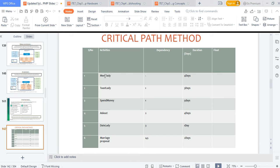Critical path method example using a marriage analogy: activities are — meet the lady, tell her 'I love you', spend money, ask her out, date, marriage proposal. Dependencies: you must meet her before saying 'I love you'; you can't spend money on someone you haven't met. The date and spending money are both prerequisites before the marriage proposal. Durations are assigned — for example, three days, five days, four days, one day, two days — showing how dependencies work in a network diagram.